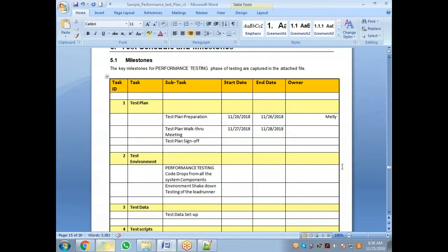And let's say the lead for this project is Samir. So we'll put Samir as the owner. So owner Samir has to walk through this test plan. Sign off, let's say, is on 11/28/2018. So sign off needs to be done. You give 3 days or 2 days for sign off so that the people need to review and sign off.